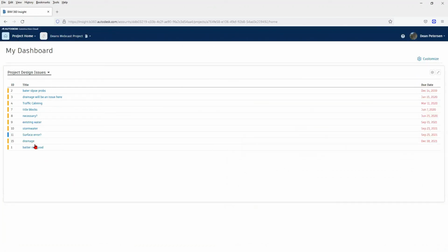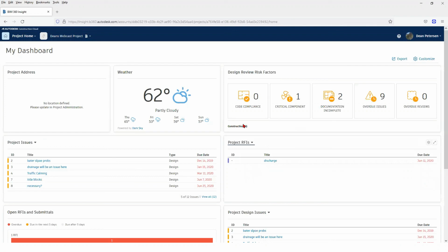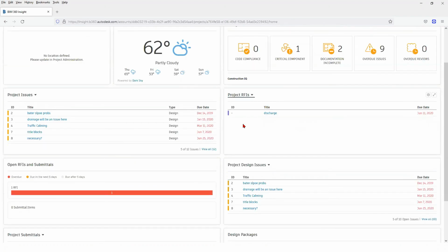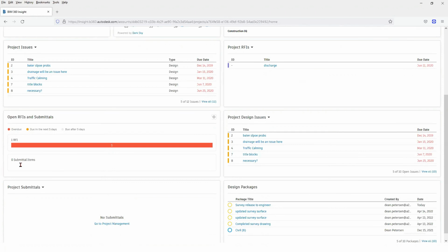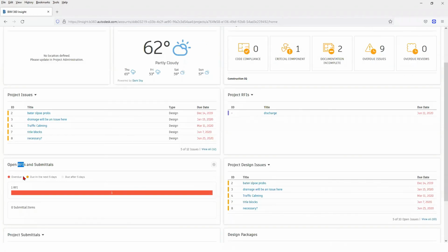Oh, these are not clash ones. Yeah, that's the difference. These are ones you can actually put issues on any drawing that you open up. You just place a pin and you do exactly the same as what we showed you here. There are actually RFIs as well, which are just a little bit more detailed than the issues, which would normally go through a manager first.